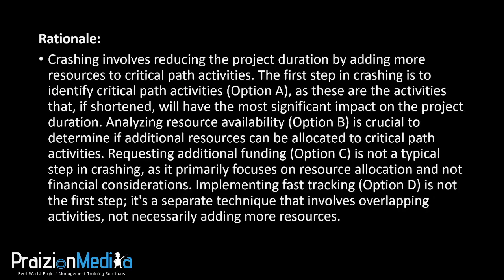Crashing involves reducing the project duration by adding more resources to critical path activities. The first step in crashing is to identify critical path activities, as these are the activities that, if shortened, will have the most significant impact on the project duration. Analyzing resource availability, option B, is crucial to determine if additional resources can be allocated to the critical path activities, but that would not be your first step.